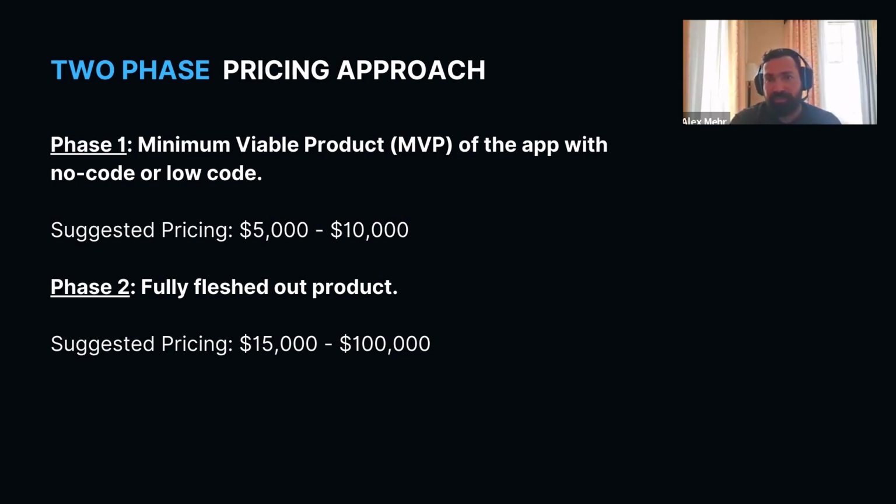And again, the range is based on what I've seen people quote us for. It can be higher. If it's a very complex project, it can be a much higher price point. Again, if it is more than 100K, I would break it down into even more phases. I would say anything over 50K, you probably want to break it down into more phases, so you have milestones. Ba-bam, ba-bam, ba-bam. Okay. Moving on.